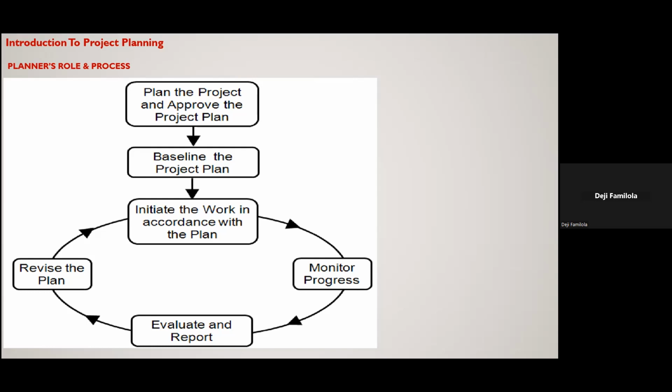And once you're able to choose, or you agree on a viable option, and you're able to get back on track, then you now issue another plan. It's called a revised plan, like a recovery plan. So every project, let me say 98% or 95% of projects, doesn't go smoothly as you've planned it. So at some point, you will run late. There will be a chance to recover. In some cases, you won't be able to recover back to where you planned to be.